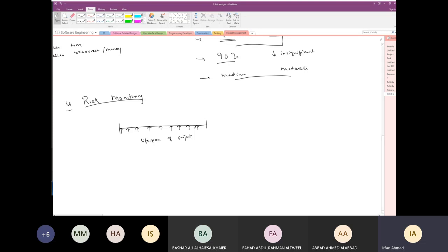And similarly, old risks might even be removed from the project. So the risks keep changing. That's important to keep in mind. Also, from the analysis point of view, you have to continuously re-evaluate the risk. Some risks were high possibility, now become moderate or low. Some have minor consequences, but now for some reason they became serious consequences. Or some were serious consequences, now they became moderate consequences. So you have to keep assessing it.